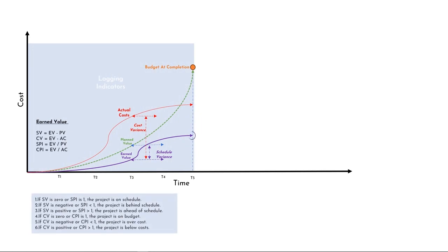The earned value indicates where the project is at and the gaps in what still needs to be delivered, helping the management to forecast how much more estimated time is required to deliver on this gap. To complete the project, additional time and costs may be required. It is called estimate to complete and helps management decide to allocate additional costs and time.